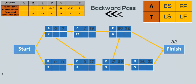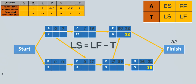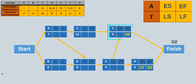Now let us do the backward pass. Since the project's completion time is 32 weeks, the latest finish times for the activities at the finish node, F and G, has to be 32. That is, F and G cannot be completed in longer than 32 weeks. We obtain the latest start times by subtracting the activity times from the latest finish. For G, the latest start time will be 32 minus 5, which gives 27. For F, the latest start will be 32 minus 6, which gives 26. Now E has two successors, F and G, with latest start times of 26 and 27 respectively. As a result, the latest time for E to finish has to be 26. When doing the backward pass, the latest finish time of an activity must be the minimum of the latest start times of its successors.